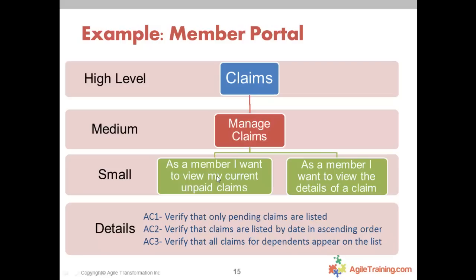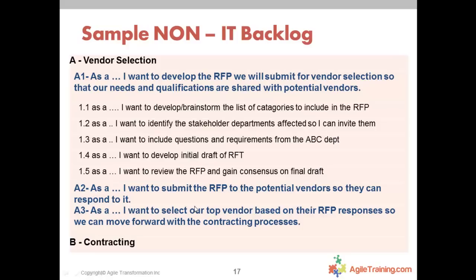Details — the acceptance criteria — are things like: verify that only pending claims are listed on this page; verify claims are listed by date in ascending order; verify all claims for dependents appear on the list. Those are one level below the story. We gather those details just-in-time — one or two iterations before that story gets done. At the beginning of the project, you're building a backlog at the story level. Getting all the detail upfront is essentially waterfall requirements gathering.